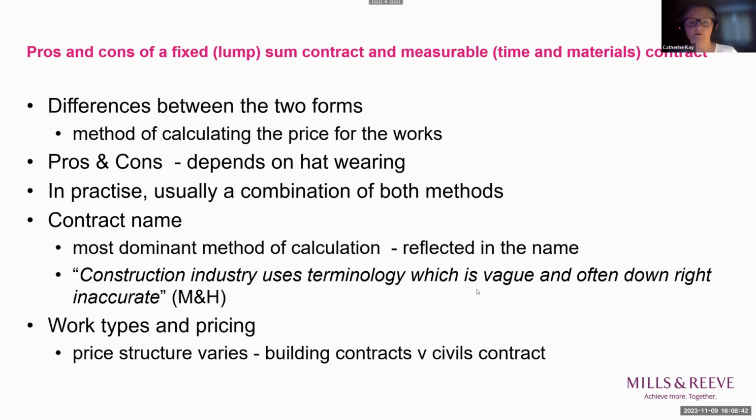So essentially the works will fall into two particular categories, fixed price or cost reimbursement. I'll just do a quick overview of fixed price and then reimbursement. In terms of fixed price, items are paid for on the basis of the contractor's predetermined estimate. But also it will include a premium, which will cover matters such as risk and different types of risk. So these could be reflecting market conditions. Looking backwards, more recently, we'll all remember market conditions being factored in being Brexit, COVID, and more latterly, Ukraine. And we've had very recent conversations in the last month or so about how we deal with Gaza.